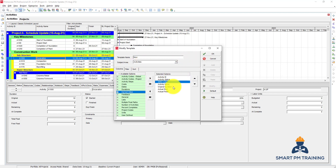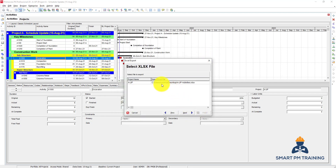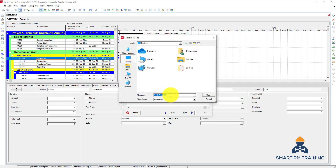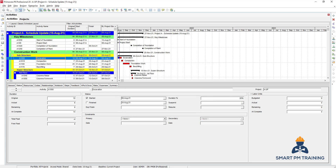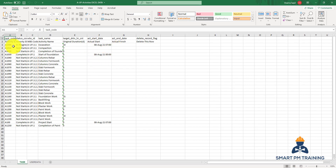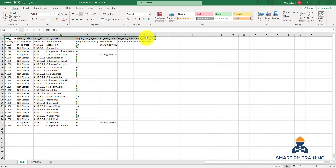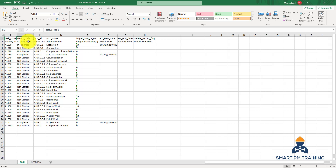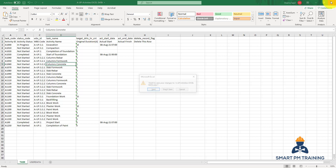You can include duration and everything related to activities. Click OK, then Next, choose the location, name it 'Excel Data', click OK, Next, Finish, and go to the desktop to open the file. This is how you know it is an Excel sheet from Primavera — the first row contains Primavera codes. For example, Primavera recognizes the activity name as 'task_name', activity status as 'status_code', and start date has its own code. This is the Primavera code, and the second row is the column title you are familiar with.